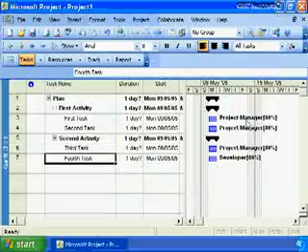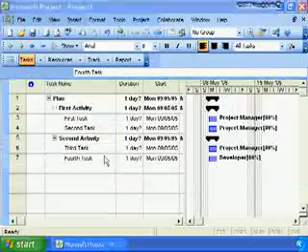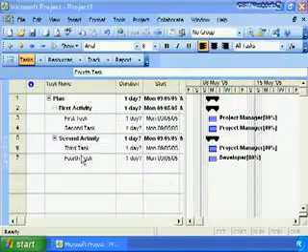So at this point, we've done the first 3 of the 4 tasks associated with creating our project plan. We developed our work breakdown structure. We added our resources to the Microsoft Project plan, and then we assigned the resources to specific task elements. Our last step is to add the estimates to Microsoft Project so we can define the work that is required to complete the tasks. This is an area where the standard view in Microsoft Project does not support project management as defined in this nugget.